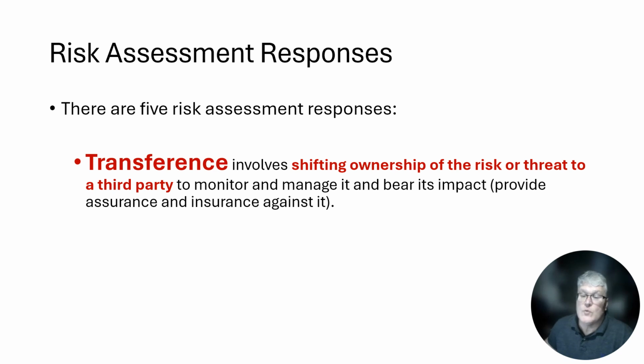Another risk response is transference. Transference involves shifting the ownership of the risk or the threat to a third party. They'll take care of it. They might use insurance or what have you, so that if this risk or threat occurs, it's not going to impact us, especially if it's monetary or property of something of that nature. And so that is transference.